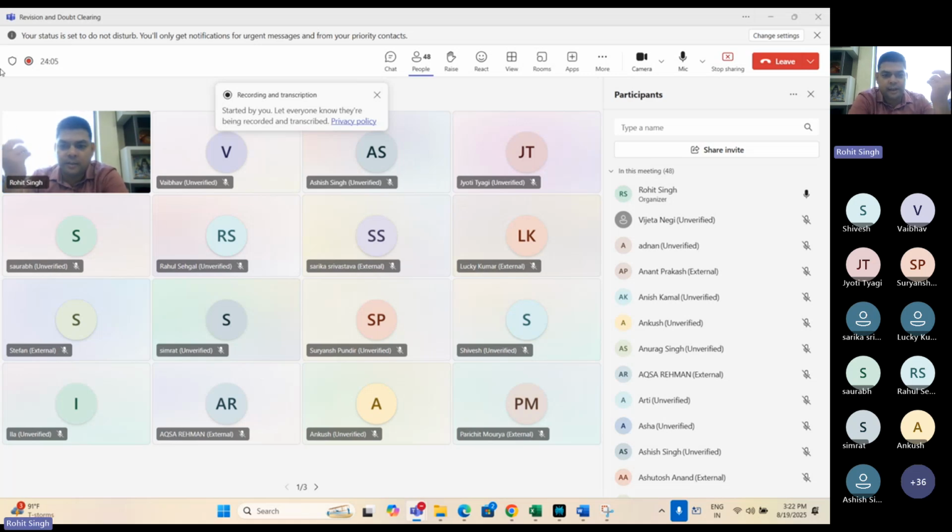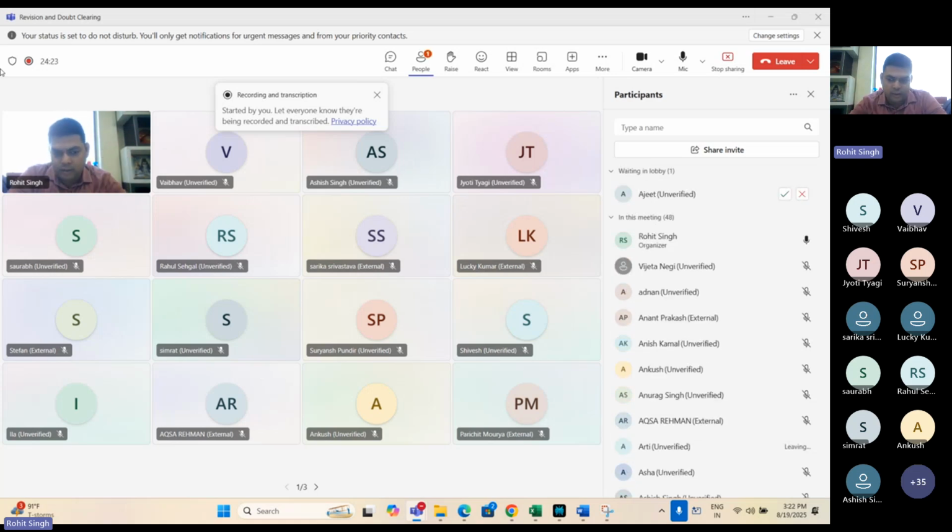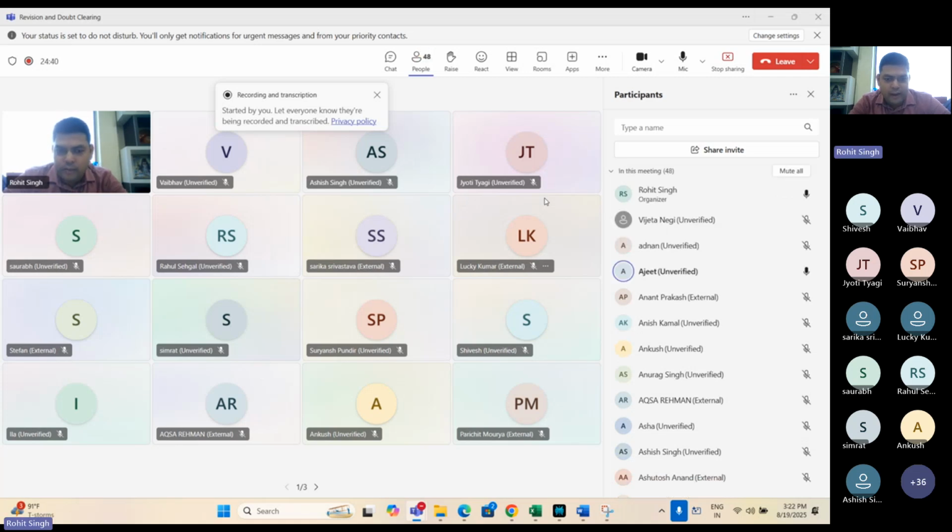Okay. Or sometimes they are also known as revised FRD or revised incorporated user stories or wireframes. Okay. What are all these documents? These documents are what we are giving to the client. Like today is 19th of August, and let's say UAT is 22nd of August. By the 20th or latest by the 19th, I am going to send some release notes, some FRDs, or all the user stories revised, incorporated and approved to the client via Confluence or maybe any other platform.